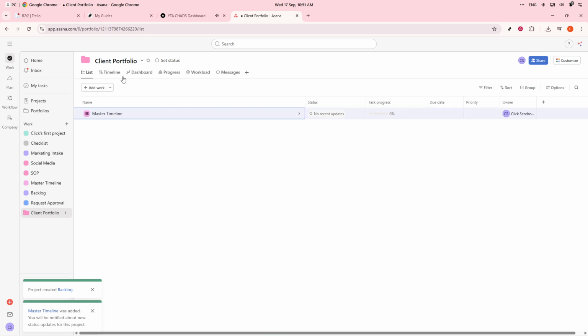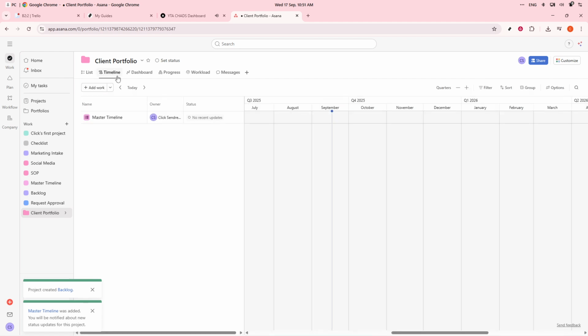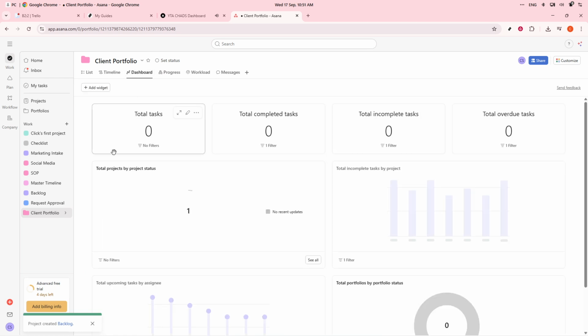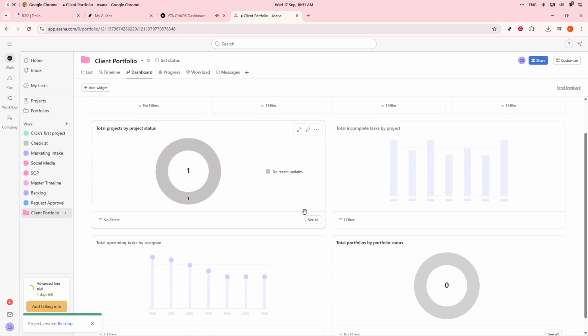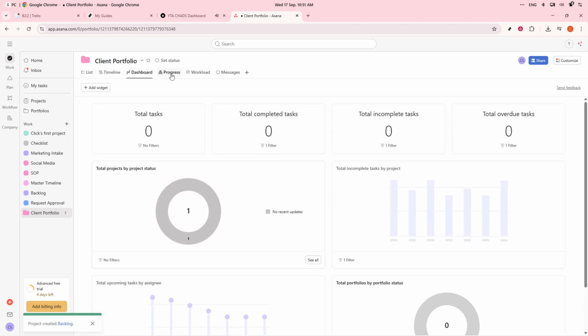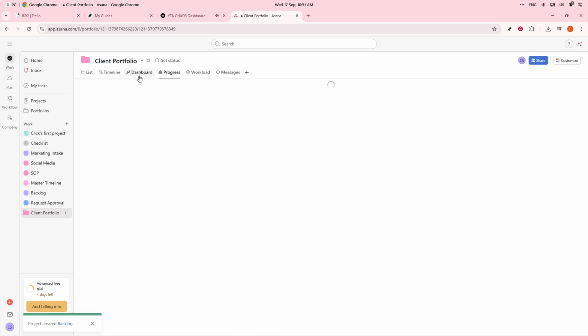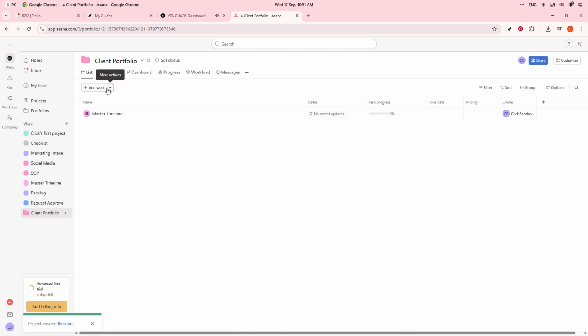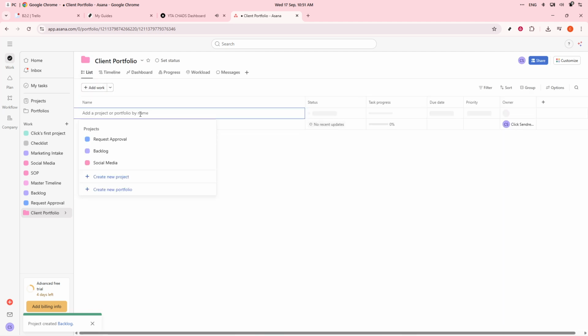Building campaign boards is crucial for visual campaign tracking, and board view serves this purpose well. Arrange columns in sequence like ideas, draft, in review, approved, scheduled, and live. Each task here represents a campaign deliverable, such as an ad creative or blog post. Additionally, make use of subtasks for detailed actions required, like content writing, design, and publishing. This structure ensures clarity and simplifies following complex campaign elements.